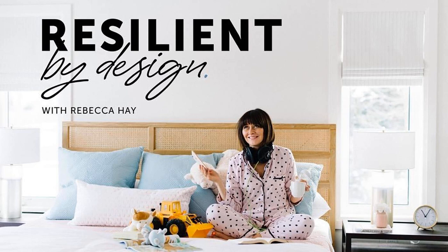than start and wait. Because it's stressful enough, right? It's so stressful. And there's nothing worse than a client coming to you saying, we want to reno our kitchen, how soon can you start? No, right? You have to fight back. You have to stand strong and say, there's a process. We need to select everything first. Then we need to place the orders and then we can schedule. And you can get the contractor in the queue.